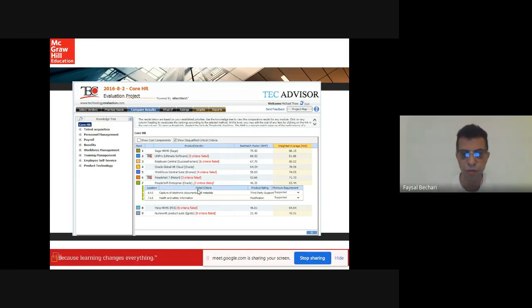The other option, if you don't want to use an application like that, is to send an RFI, a request for information, to vendors after you're fully aware of your requirements, because you don't want them to deceive you on some requirement. Then from the RFI, you select some of these companies, and you convert this information to an RFP, a request for proposal, and send it to those you selected, let them respond, and there is a process of selection between them.